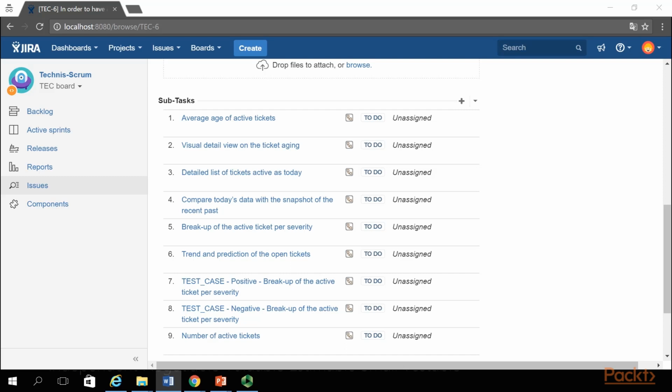Still, for Amelia to fully prepare the sprint, she needs to structure the quality assurance for the user story. She needs to define the criteria under which the outcome of the sprint implementation for a given user story will be objectively accepted as done and added to the product increment. The desired business value attached to the user story, or the whole MVP, is going to be measured and assessed.